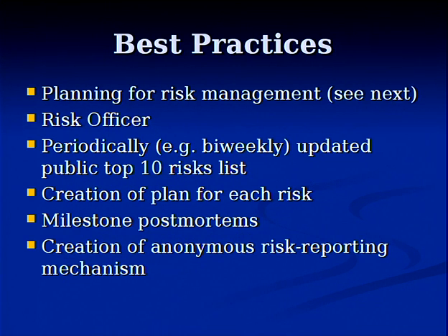So what are some best practices here? Planning for risk management, appointing a risk officer. I'm not talking about a full-time position. I'm not talking about a sage who sits back every day and solely ponders the risks that are approaching. I'm talking about someone who, on a weekly basis maybe, is seeking to think, are there any new risks? And is talking to people in the project with the conscious desire to hear, are there any problems that they see, any things they're worried about?